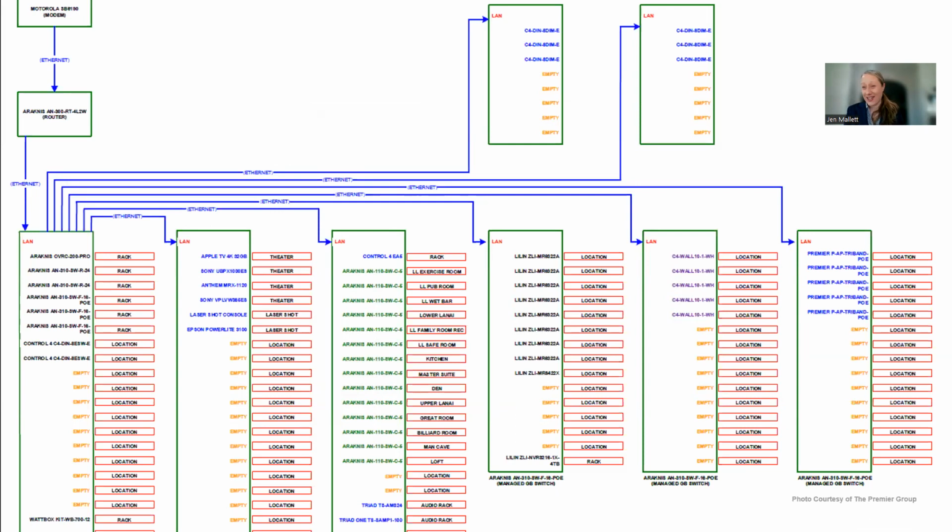Now, this is an eye chart, but I think it's a really great way to visually represent why it's so important within today's world to really have a great network design. We find that really great network design within a new build project will be anywhere from 15 to 20% of their technology design budget. And the reason is that the world revolves around the internet, right? Nowadays, and everything is internet connected.